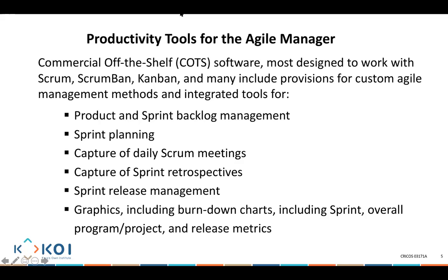Now, other things to think about from an agile management perspective: there are graphs, such as what we call a burn down chart, which shows you how much work you're doing every day and how much work is remaining. As you start doing more work, the chart will go down until it reaches 0, because we've already delivered everything we need to deliver. We also have burn up charts, for example, to show when we actually finish the work, and how much work we are finishing cumulatively at various points in time.